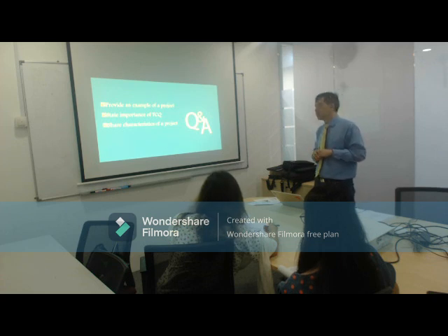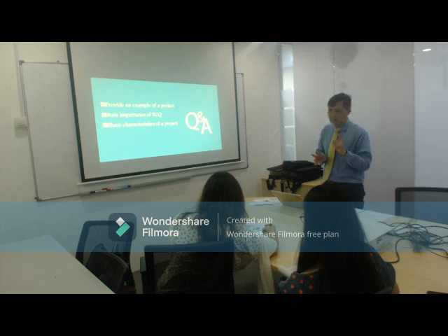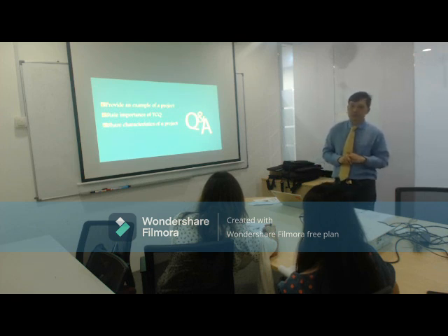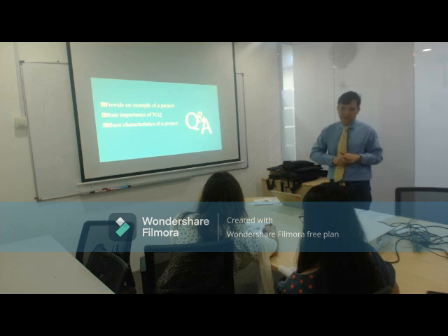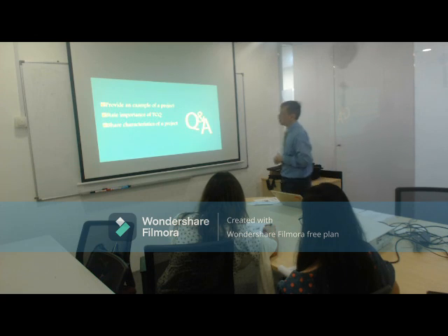Yeah, in any project, it is very common that we concentrate on two and sacrifice one. So the management has to agree on which one is the one to sacrifice. Once it's agreed during the beginning of the project, everyone agrees on it, then they will just proceed with it. So it's easier.